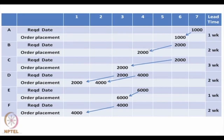Now, 2000 items of B — each item of B requires 2 items of D and 3 items of E — so 4000 items of D and 6000 items of E must be available on day 4. With a 2-week delay for D and a 1-week delay for E, the order must be placed for D on August 2nd and for E on August 3rd. Similarly one can calculate the rest.